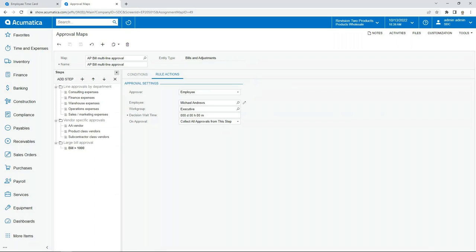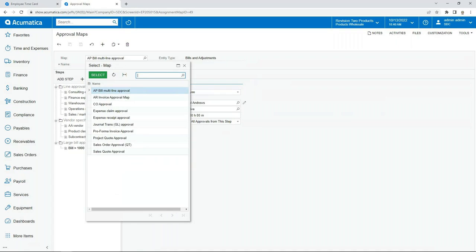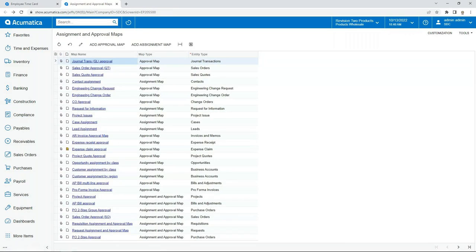So it can be role-based, right? Yeah, if your approval process is role-based, then that PO is issued to a job. On the job record, we identify who the project manager is. So if it's a role-based rule, then it'll route through to that role on that project, automatically filtering so that project manager only sees the POs that are awaiting their approval. Yeah.